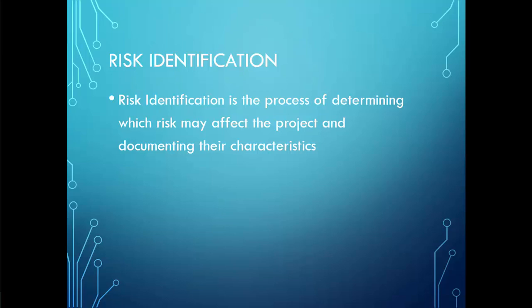It's also recommended to first focus on overall project risks, then identify specific risks. The team should use the work breakdown structure to help organize the risk identification process. The team should also seek input from sources outside their group.